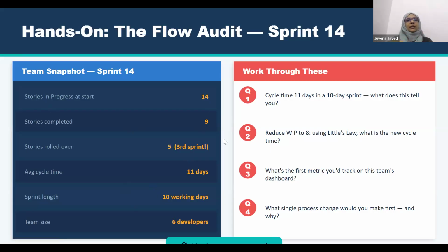Overall, what I just wanted to explain here is how we can identify where we have to work. With the first question, what we identified is that we work on the backlog and the sprint planning. We have to make sure the stories are split properly, small stories, so the team is able to complete all the work within the sprint. Whatever in-progress items we also need to calculate in our cycle time. In-progress items will definitely be in the cycle time because work started in in progress. Correct. Then the work moves to done. So all these are added in the cycle time.